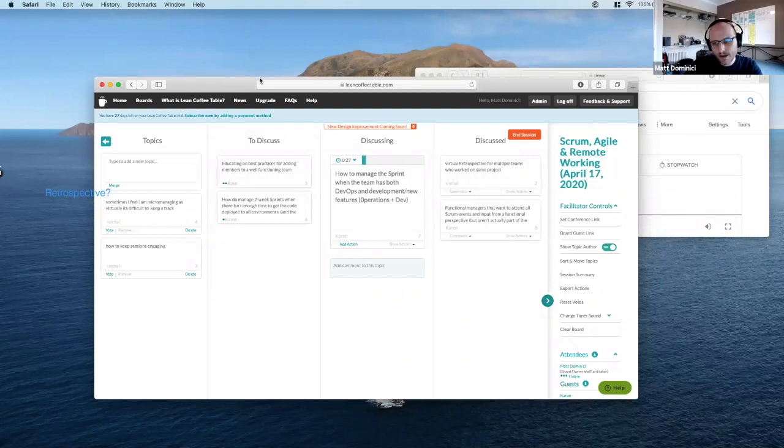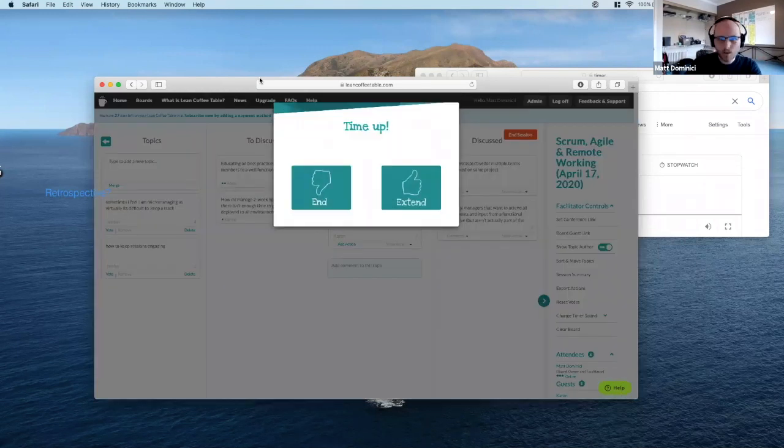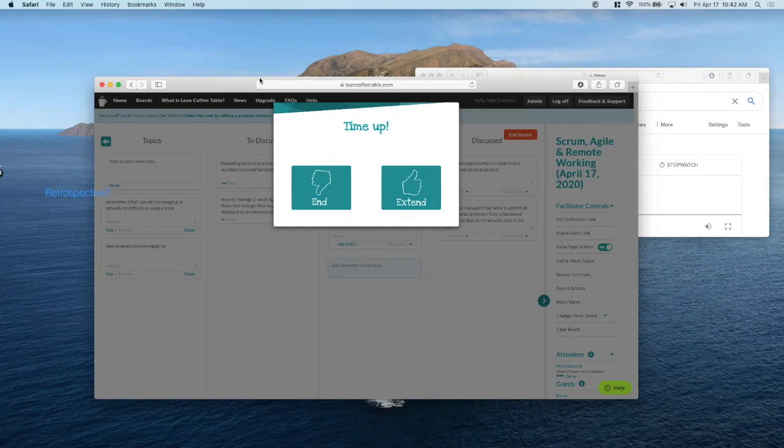The next level to that is, how do we bake that kind of work, that research and design, into the actual product backlog item of the delivery of that feature itself? That one is a little bit harder to get to because sometimes the lead time is a lot longer when we're talking about research and all that sort of thing. But ideally, it's part of the work, right? We have this product backlog item, this feature, whatever it is that we need to develop and deliver. Part of the work is doing the research around that. It gets a little bit uncomfortable because sometimes it ends up spanning sprints, but that's the next place to go.